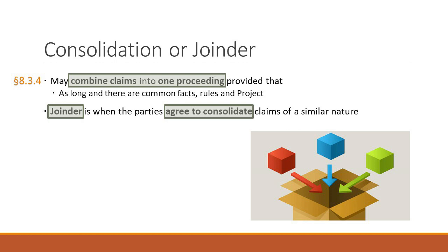8.3.4.2, either party's sole discretion may include joinder of persons or entities substantially involved in a common question of law or fact. So it doesn't necessarily... if you look at 8.3.4.1, these are if the arbitration permits, and there's substantially similar questions and procedural rules. This one's a little bit different, in that they can bring somebody in on the common questions of law or fact, but not all of those, provided that the parties sought to be joined consent in writing.